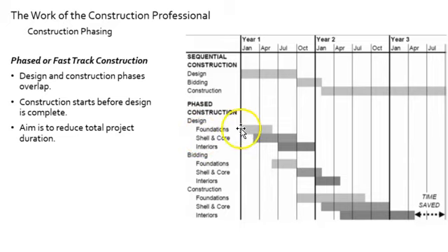So here we have foundations happening. The foundation design is occurring. When that is finished, we can bid out that foundation. When the foundation award is given, we begin the foundation construction.